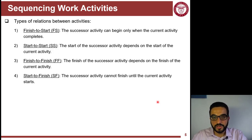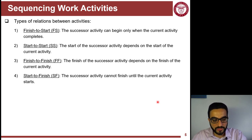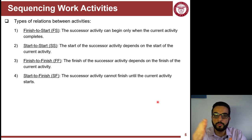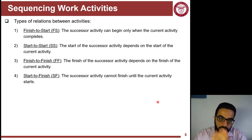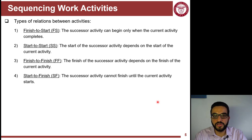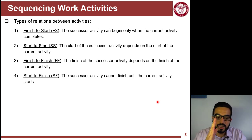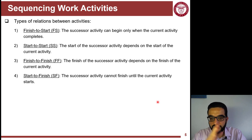Once you decide on sequencing and logic, there are different ways to represent the relationships between activities. There are four types: Finish-to-Start (FS), Start-to-Start (SS), Finish-to-Finish (FF), and Start-to-Finish (SF). Finish-to-Start means you must finish the predecessor before starting the successor. Start-to-Start means once you start the predecessor, you can start the successor — the dependency is not on completing the full duration of the first activity.